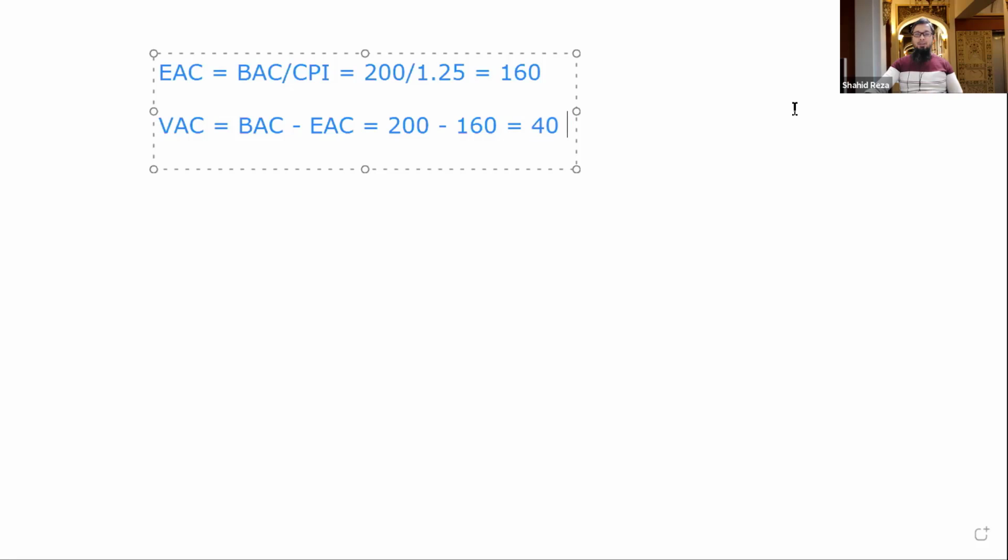All right. So we have already expended how much money? $120. So if we can keep our progress the same, then how much money we need to complete the project? New EAC minus AC. ETC means estimate to complete.